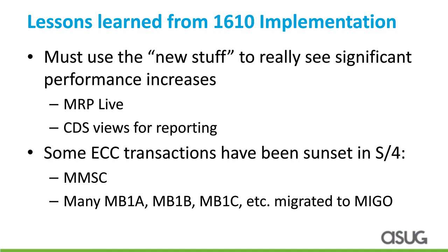Perfect, thank you. And so inside of S4, I just want to talk about this for a moment. I think this was a great decision that we made. Anytime you do a project, think about this: we as a team got together, we started on S4 1511, which we believed was fairly solid, but it was missing some functionality that was required at Delta Faucet. You've heard some of it that we've implemented here with the digital core and ERP. But we made the decision mid-project to go to S4 1610, which I believe was a great decision.